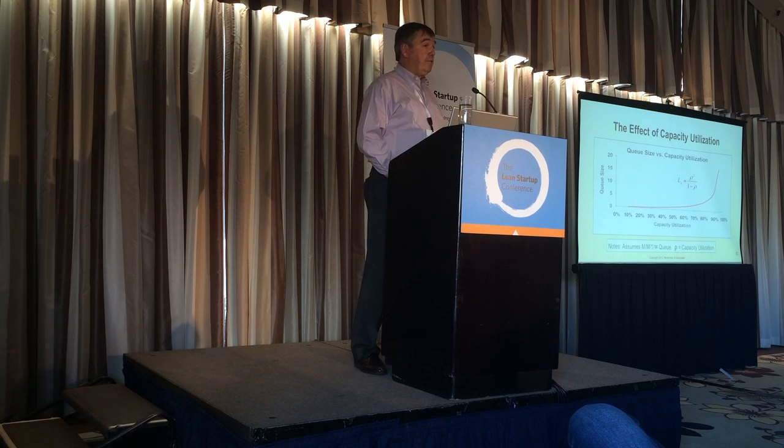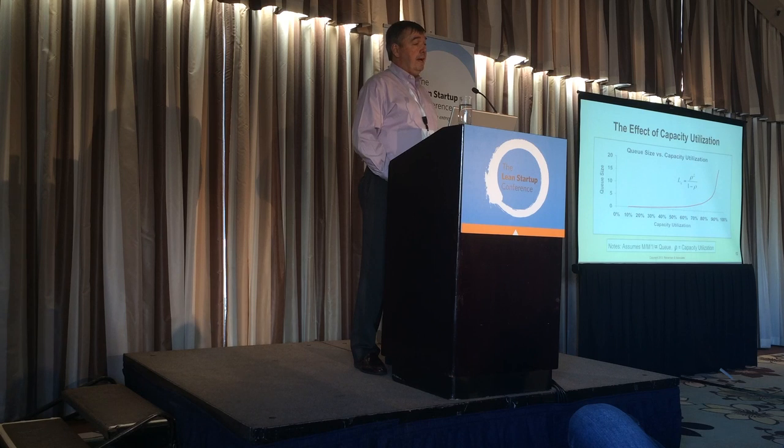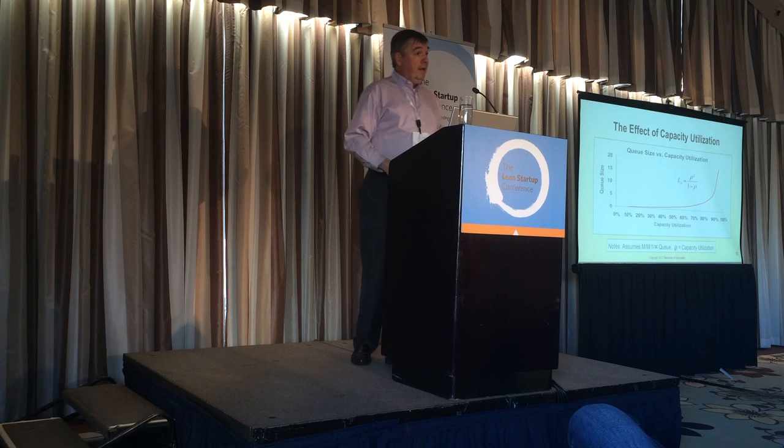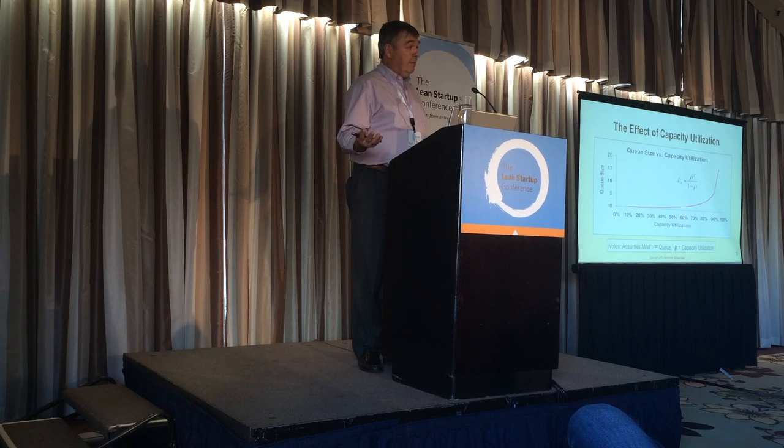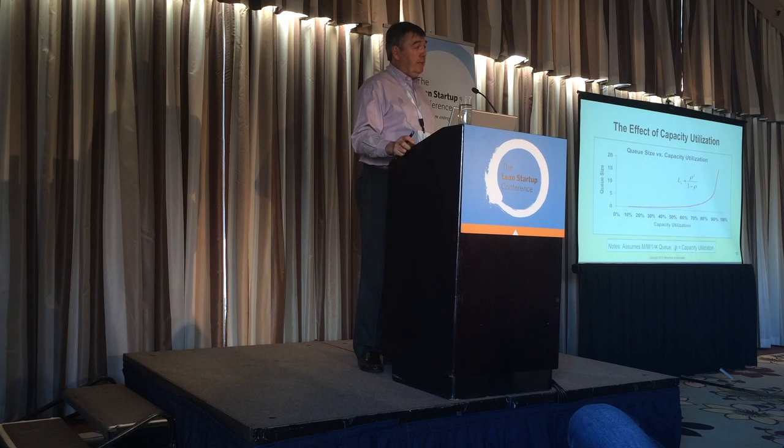Why will a competent factory manager not load to 95% utilization? Because they know they cannot make deliveries when they load to that level of utilization. For 14 years, I was collecting data from the executive courses I taught at Caltech. I was asking people, what level of utilization do you load your development process to? The average was 98.5% utilization. Now, what has intrinsically more variability, product development or manufacturing? Product development has more intrinsic variability. Logically, you would expect a lower level of loading in a product development process.